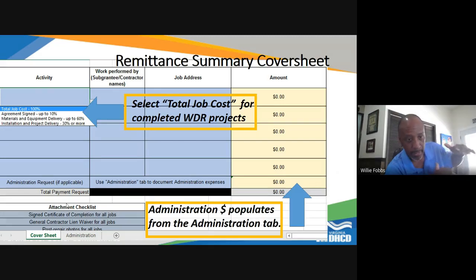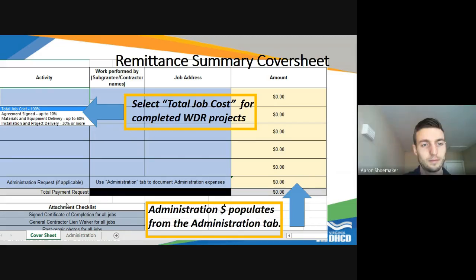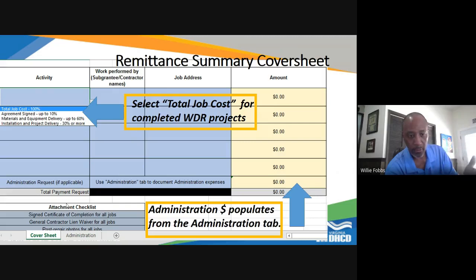But what I'm hearing is, in that scenario, you will have gotten your full estimates. And if you're using the example of the three-part draw, once those estimates are submitted, you would be able to draw down the initial 10% on the job, and then the other 60% draws would happen based on the delivery of the cost of materials. I'm just thinking out loud, but if the first portion of the job amounts to 40% of the request, then I would think that's what you would draw down on your second draw. So on a job like that, you may be looking at a 3-draw or a 4-draw process instead of the 3-draw that's outlined.